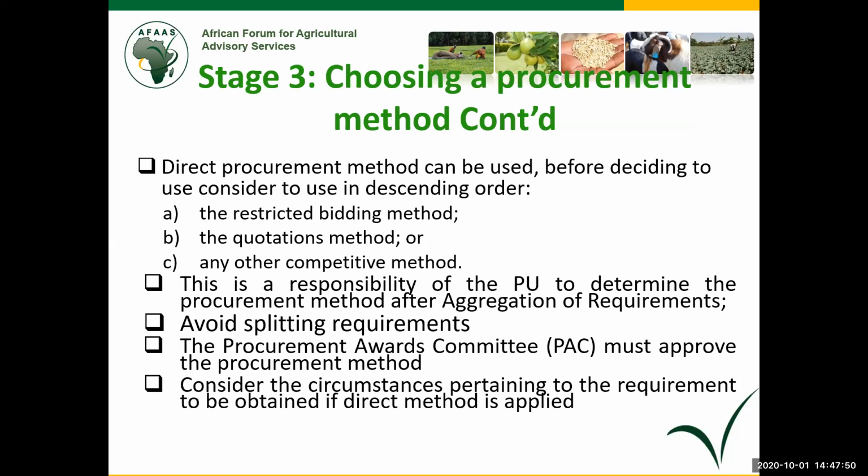In this method, however, there could be other reasons, like for example, you have been seeing in several consultancies, where we say that it is a natural continuation of similar works, and we are just extending, we are just adding some scope or some time on that contract, or even having under new funding a new consultant. And we say, yes, we recruited him under RMP, but because the works are a natural continuation under CADAP, we use direct or single source, and then we proceed with the contracting.